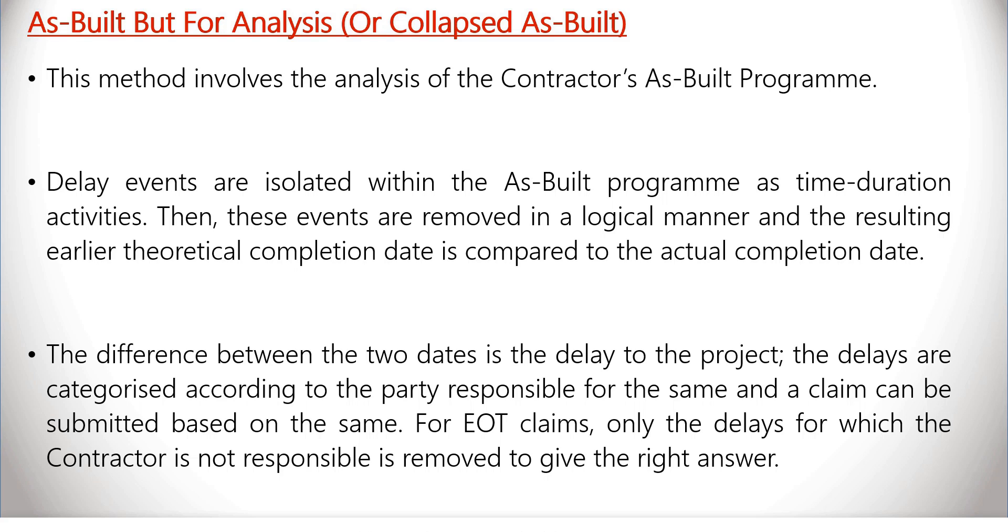For EOT claims, only the delays for which the contractor is not responsible is removed to give the right answer.